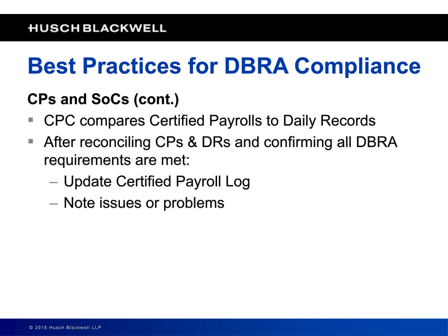If there's discrepancies, if the clerk is finding problems, there's a disconnect between the daily record and the certified payroll, or the statement of compliance is not right, that log should be noted with what that discrepancy is. Any correspondence that you have with the subcontractor thereafter, where you tell them, hey, I got your certified payroll, you have 3 people listed on your daily report for May 2nd that don't show up on your certified payroll, this seems to be inadequate to me, you keep a record that you sent that, and you note that in this log.